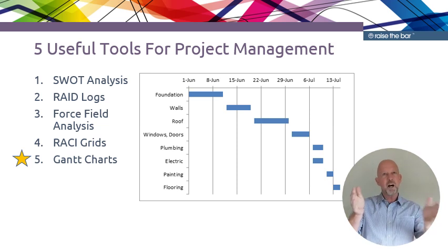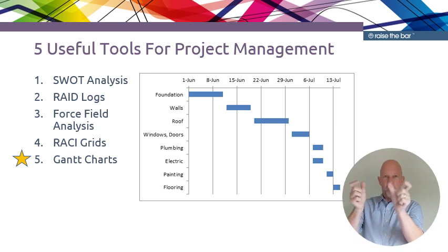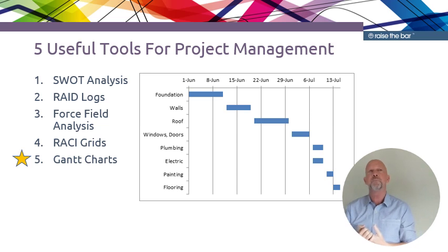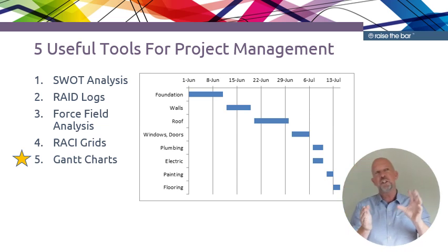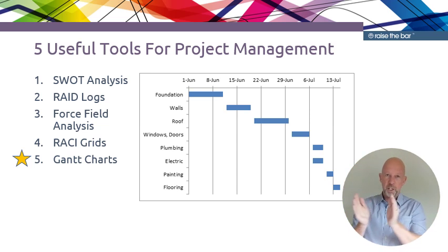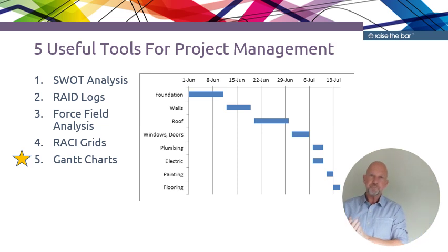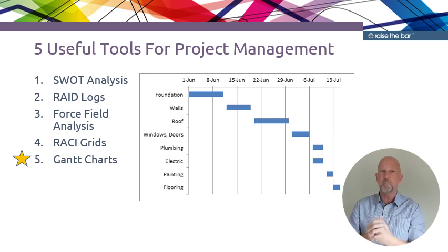That is the longest time it will take if everything's done on time through. It also shows where the dependencies lie, which we talked about earlier from the RAID log. And what they do is then show us where there's any float in the delivery or implementation of tasks. So sometimes we can have tasks that have a lot of float. It doesn't matter if we start them early or late and they can still be done.